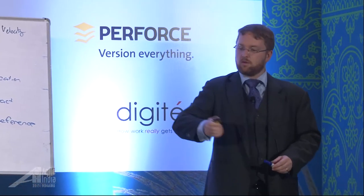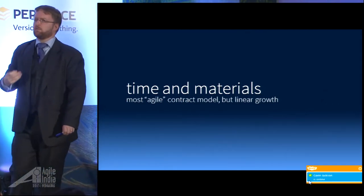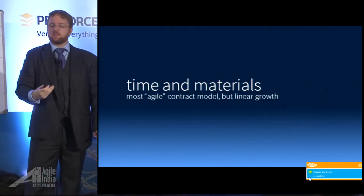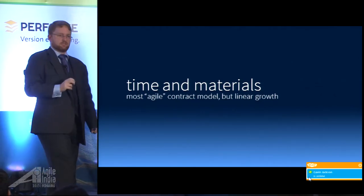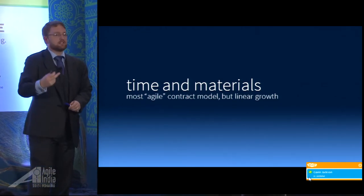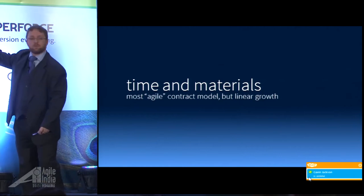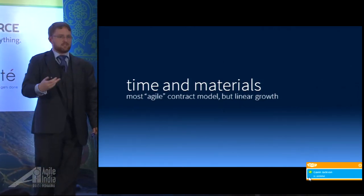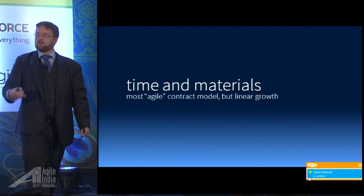There's another type of contract. The disadvantage of time and materials is it's a linear growth. From a vendor perspective, one of the problems with T&M is you're putting your people in and having a fixed percentage profit on top. If you're more efficient, you actually get less money. So there's no incentive from a vendor perspective to increase efficiency — except from a trust perspective. At these bottom levels, especially at that level of contract-based trust, there is no benefit to innovation.